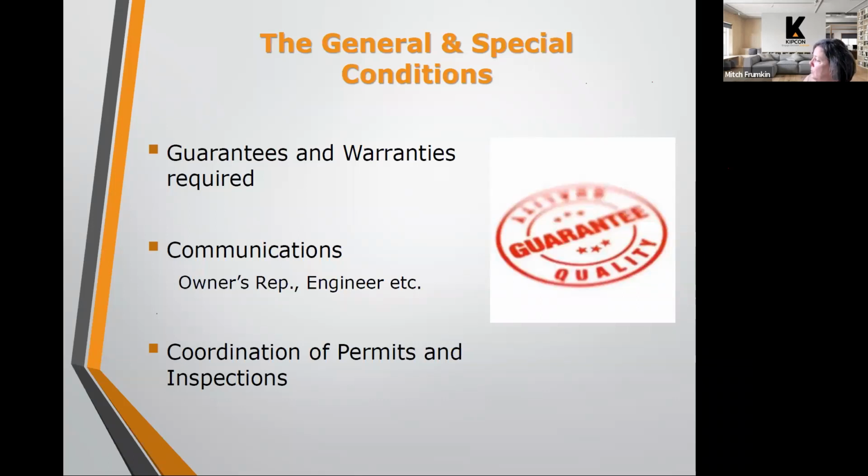So again, using our roadway project, typically once a contractor leaves the site, there's a warranty of a 1 year period, for example. Sometimes it might be a 2 year period, but 1 year period is more common. It's not very common for an asphalt contractor to want to go beyond that.